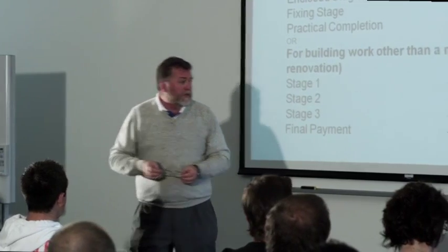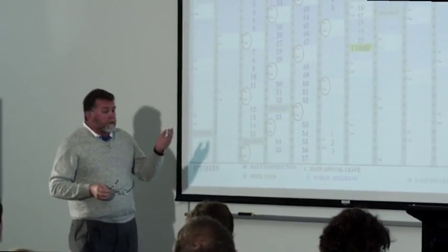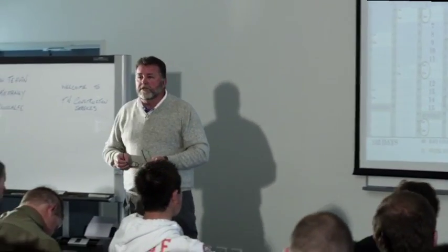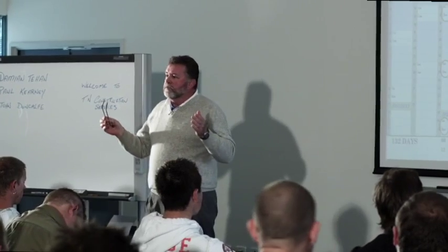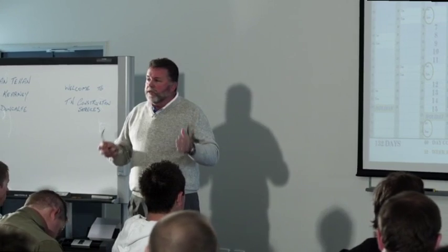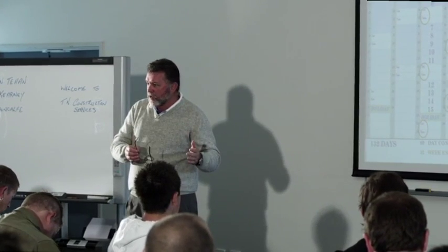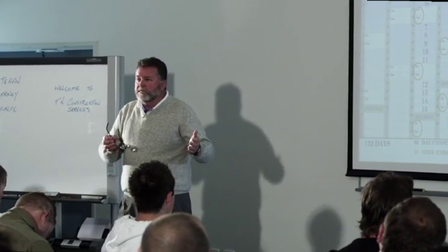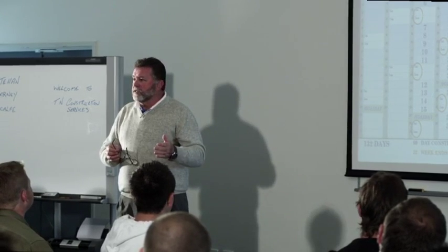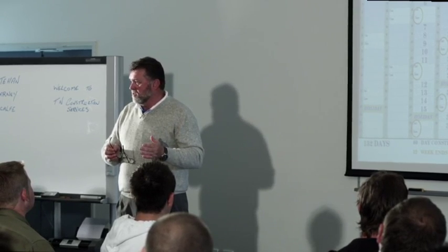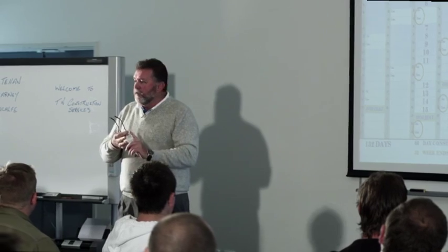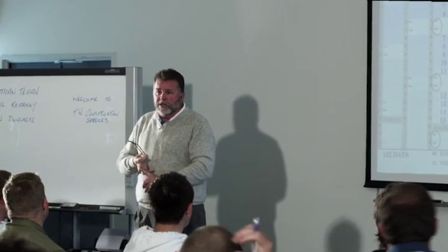All right, so we'll just keep going here at the moment. This particular slide says that under the legislation, you must give the owner a period of time to do the works. Now, it is not just the construction period, that might be 16 weeks, Monday to Friday. You must make allowances for all other delays: weekends, public holidays, and if you're going across the Christmas period, the Christmas shutdown.